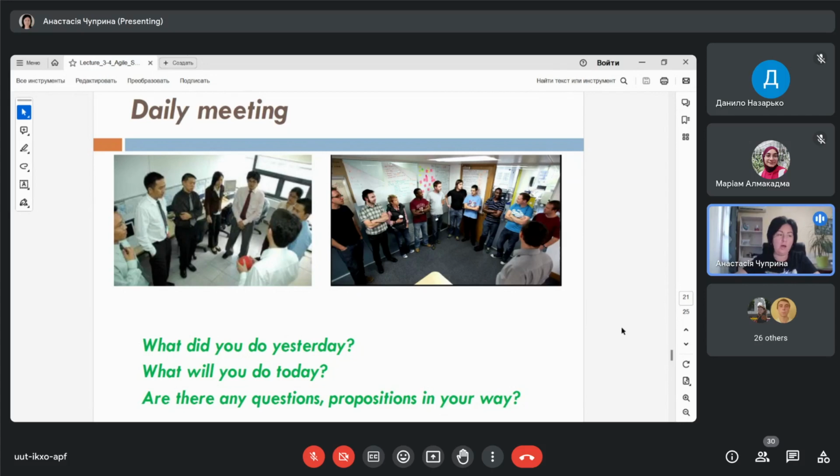After each meeting, I will give you an example of the document. It is called meetings, and it is the responsibility of Scrum Master or business analyst to fill this document after each meeting. The document contains information about date, about time of the meeting, who participated in this meeting, what questions were asked, what solutions you agreed, and this is a short document, 1 page. After the meeting finishes, Scrum Master sends it to everybody.